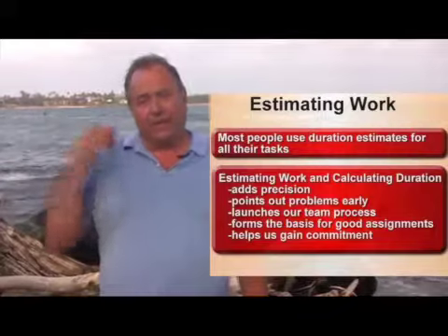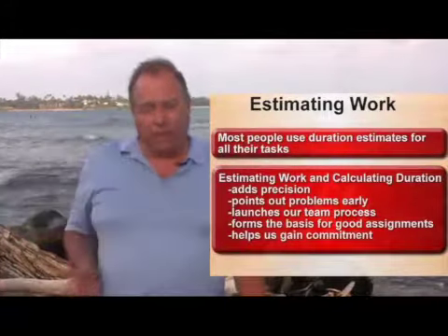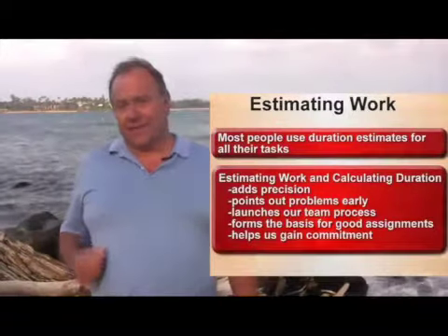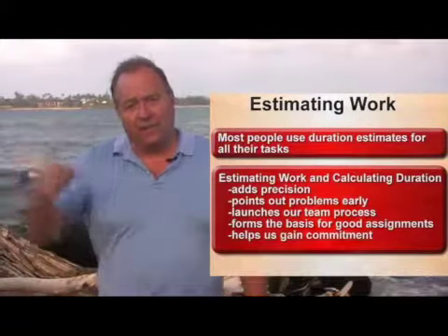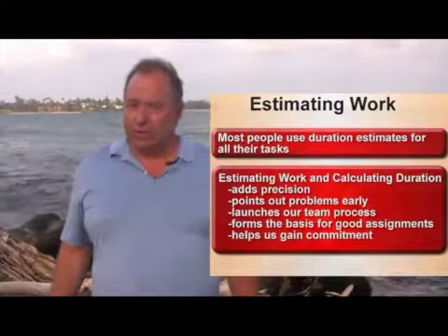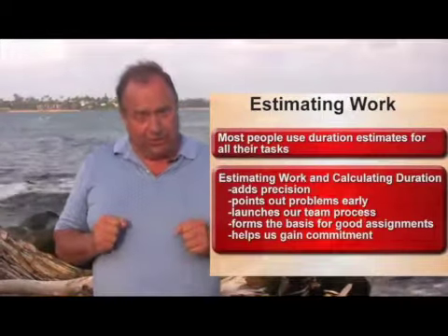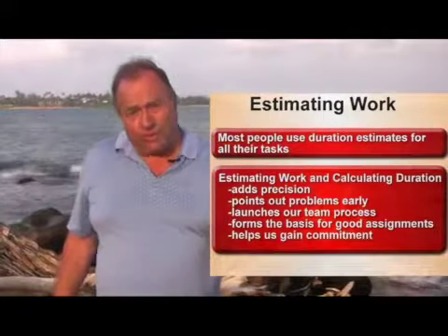On the other hand, if you and I agree that my task is going to be 120 hours worth of work, and the first week I come back and tell you I got 20 hours done and I've got 100 hours remaining, well, you know a couple of things. One, the original estimate of 120 hours is still good. But I only got 20 hours worth of work done this week, not the 40 that was scheduled.